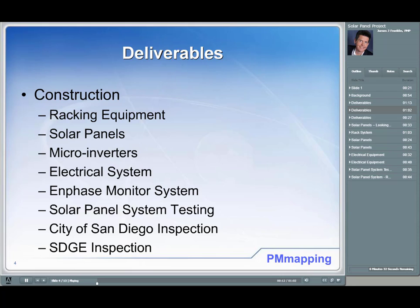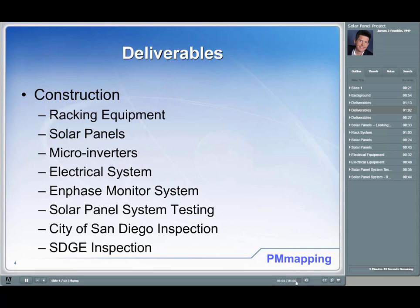The microinverters convert sunshine into AC electricity. The electrical system includes the conduit, wires, and control panel. There was also a monitoring system — we used Enphase microinverters, which had their own monitoring system connected to the inverters, reviewable via a website. There was solar panel system testing, which I incorporated into the construction phase. There was also a city of San Diego inspection — you can't start the system until they approve. And finally, SDG&E had an inspection as well; before we could start operating, they had to inspect and approve the system.